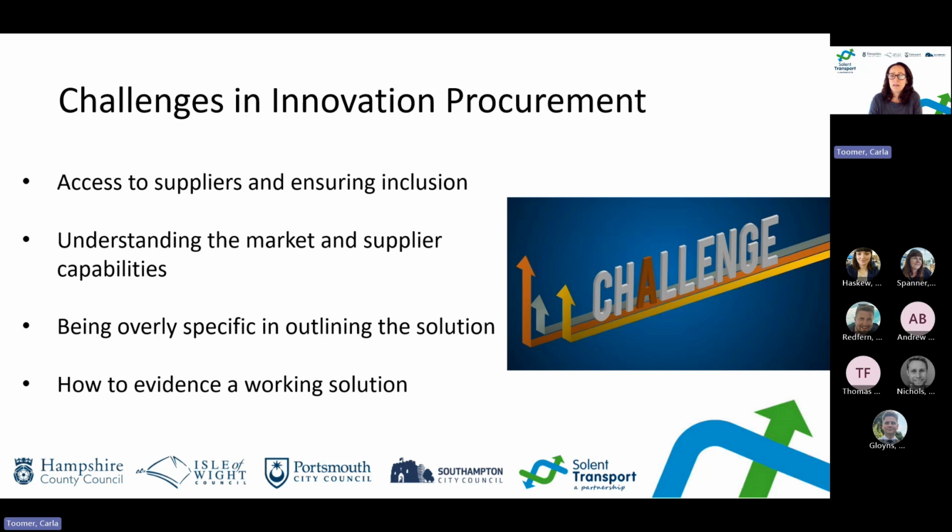And we attacked this really by making sure that we started stakeholder activities earlier than you normally would in a general project life cycle. So we didn't wait until discovery phase. We needed to know before that and identify whether or not the solution even exists or is possible. So we attended conferences and exhibitions and spoke to the industry to aid this, and to also allow our local authority to determine whether or not we needed extra external consultants and to what extent.